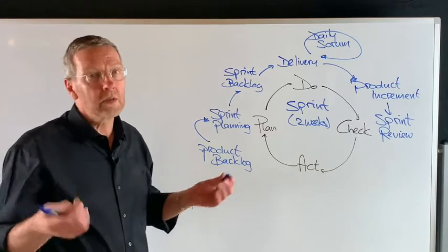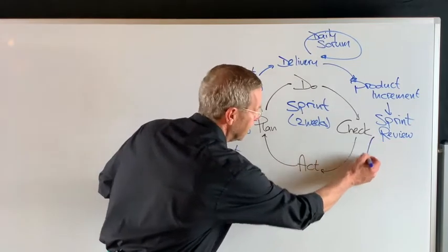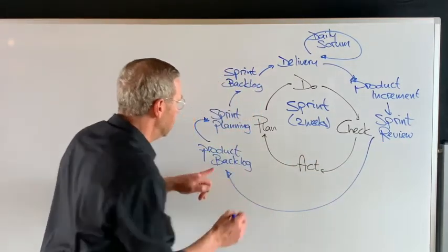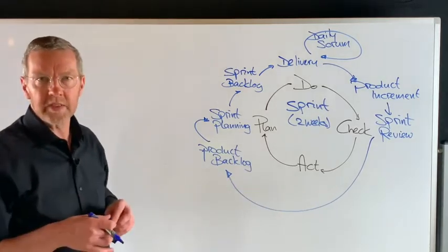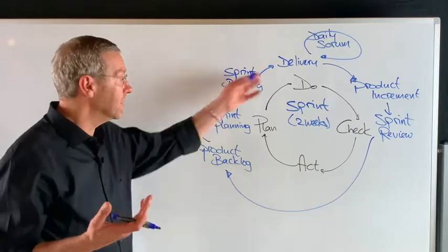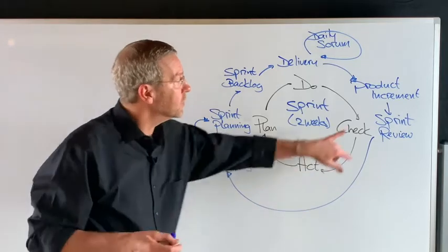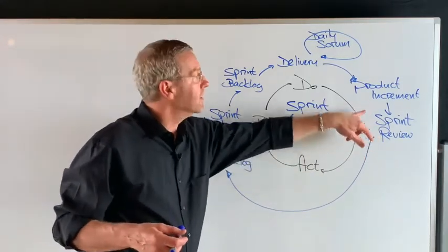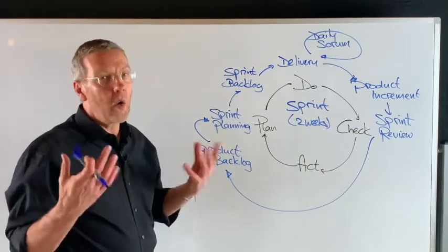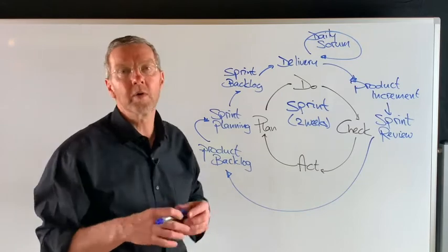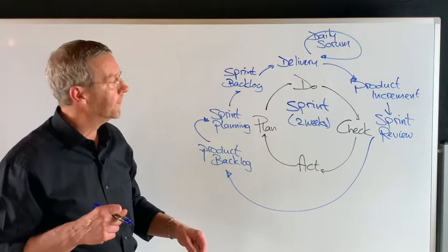Doing something, well, all work is in the product backlog. So the results of the sprint review go on the product backlog. That is where the work gets collected, and it's maybe the next sprint where that material that's too thin gets picked up. So sprint review, inspecting what got produced and taking the feedback, all necessary people, all stakeholders, all people from the whole value chain are there to look at it every two weeks.